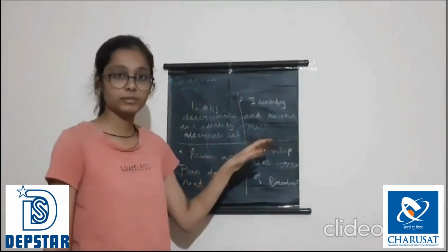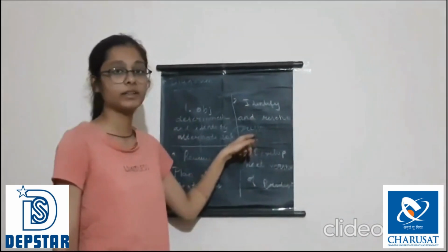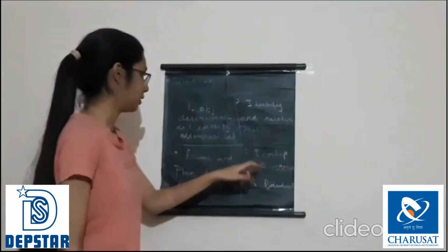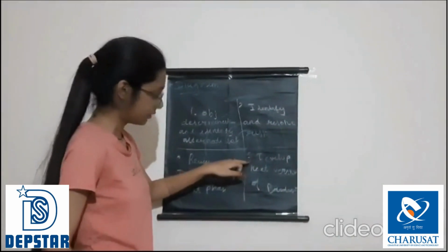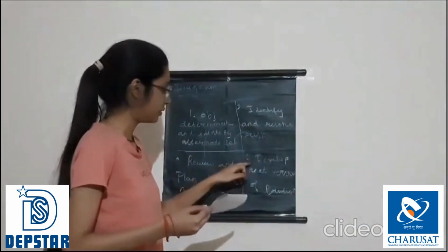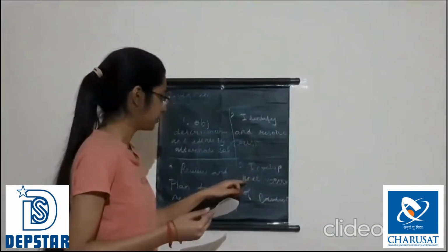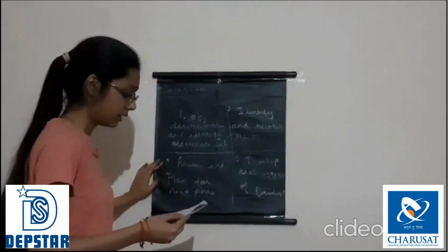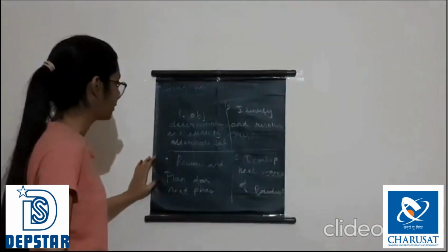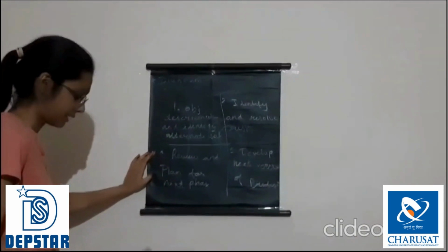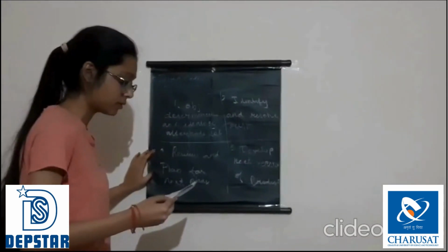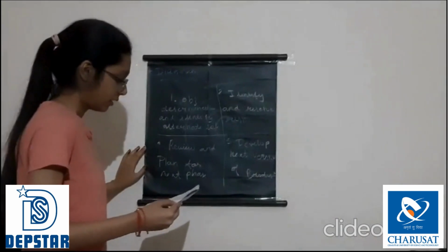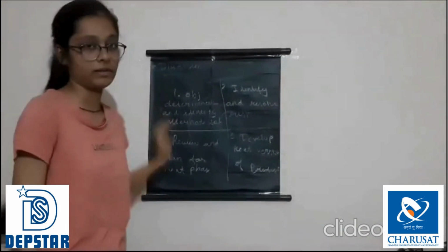From all those alternative ideas which we proposed in the first quadrant, we select the best possible idea in the second quadrant, and the risk associated with it gets resolved there. In the third quadrant, we develop features and verify them through testing, and at the end of the third quadrant, the next version of the software is available. And in the fourth, review and plan for the next phase. The customer evaluates the version of the software developed so far, and in the end, the next phase gets started.